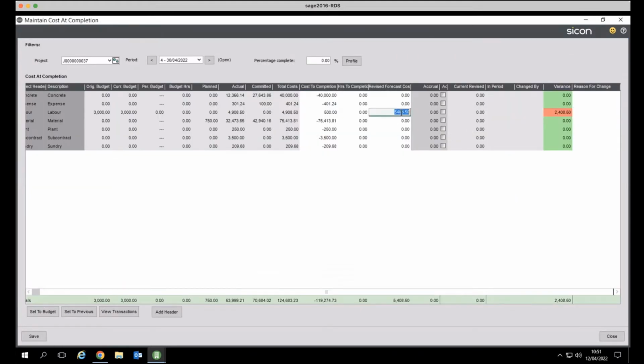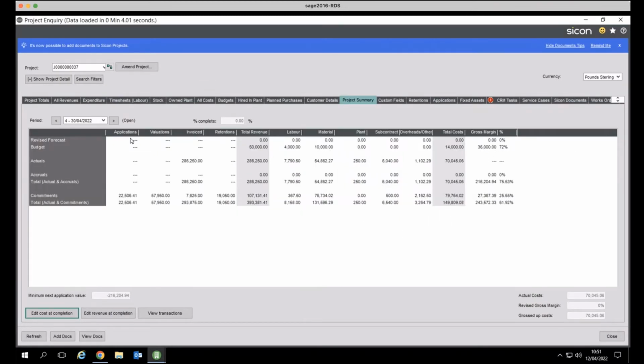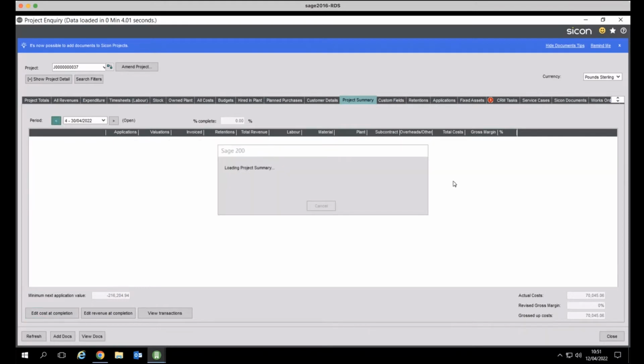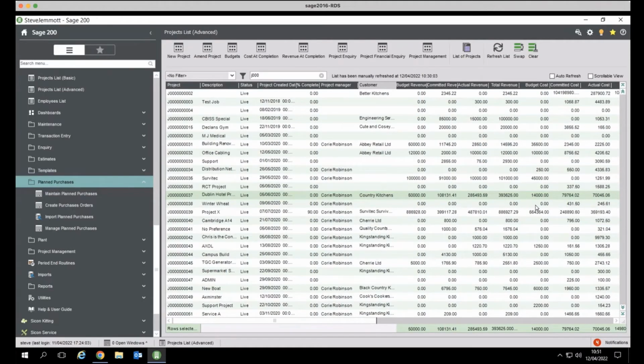But what we can also do, and I'm going to change this to £10,000 for my simple maths. If I say that I think we're 50% of the way through the project, there's my figures also accrue in the accounts. So as I go through and we update each of these, that of course is going to be updating our forecast. And as we go back through, you're going to see the figures are going to change as we go back through the various different periods as well, because that's based on the point in time in terms of the transactions. But once we've done that, that's all of our projects now sort of up to date.